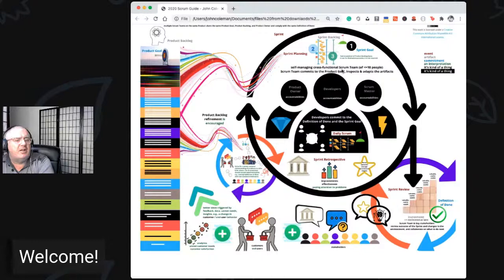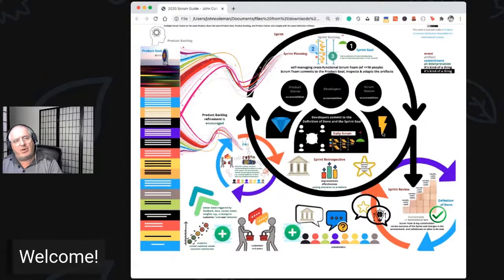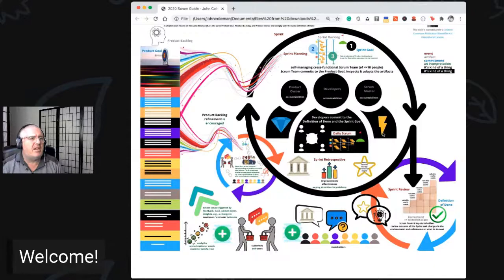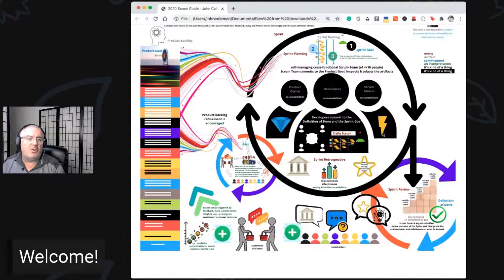Definition of Done — we didn't know what to call it before, but at Scrum.org many people say if you say 'Scrum' in two words it's 'done increment,' and Definition of Done is a commitment to the increment. In terms of hardness of commitments: we're striving to achieve the product goal, striving to attain the sprint goal, and hopefully the Definition of Done is the hardest commitment. In exceptional circumstances you might take on technical debt consciously and put it on the product backlog — but that's exceptional.